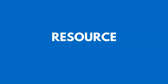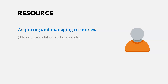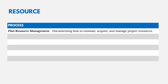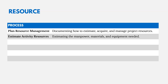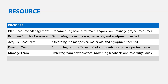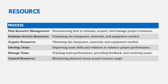Resource management covers acquiring and managing resources — both labor and materials. There are six processes: two in planning, three in executing, and one in monitoring and controlling. We plan resource management and estimate the resources needed — manpower, materials, and equipment. We then acquire those resources, develop the team by improving skills to improve performance, and manage the team by tracking performance, providing feedback, and resolving issues. Finally, we control resources by monitoring planned versus actual resource usage.